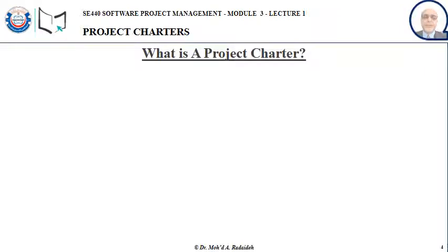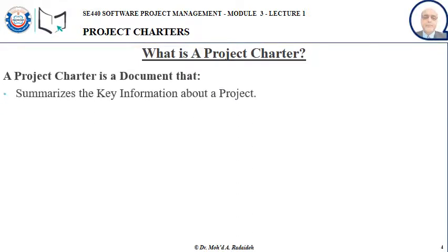Now, the first question that we need to answer is, what is a project charter? What is it all about? Well, a project charter is an executive summary of the project opportunity based on the request for a proposal that we receive from the customer, in which we summarize the key information about the project. We assign an individual from our side as a service provider to be the project manager for that project in case we carry on with it.